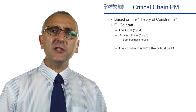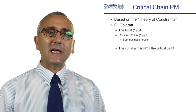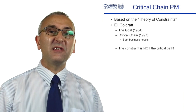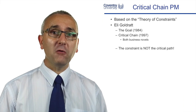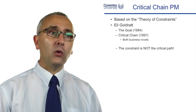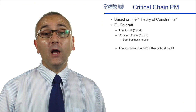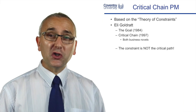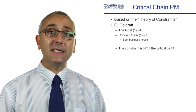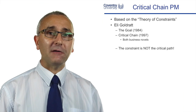Let's look at critical chain project management. Critical chain has been evolved from Eli Goldratt's book The Goal and the Theory of Constraints. There was a book published in novel format, rather like The Goal, called Critical Chain in 1997. Basically what Eli Goldratt is saying is that the constraints to your project isn't the time, it isn't the critical path — it's the resources that you have.